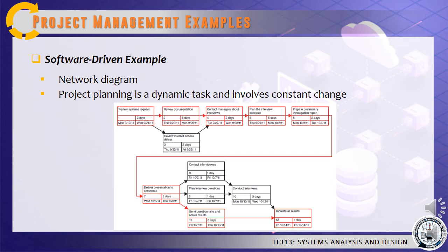After you complete the Gantt chart, you decide to view the data in the form of a Microsoft Project Network diagram, which is similar to a PERT chart. When you select the Network Diagram option on the View menu, you can see the project tasks and dependencies. You study the diagram and see that the program has calculated a start and finish date for each task. Notice that the diagram displays the same information as the Gantt chart, including task dependencies, and also includes a red line that indicates the project's critical path.